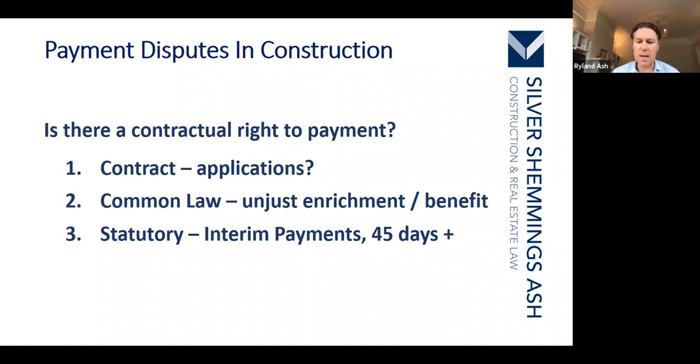Now, the key change over the years to that principle has been the introduction of the Construction Act. The Housing Grants, Construction and Regeneration Act 96, amended in 2011 by the Local Democracy, Economic Development and Construction Act. Long name, but we call them the Construction Acts. And what that did was introduce a right to interim payments, payments as you move along the job, which modifies this principle, which is still good law, that you only get paid when you're completing works.